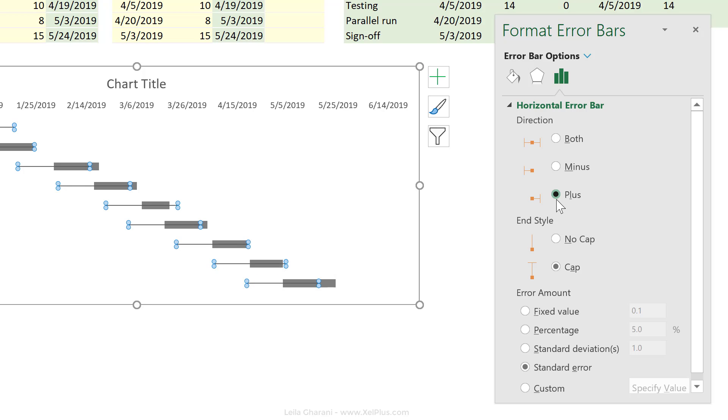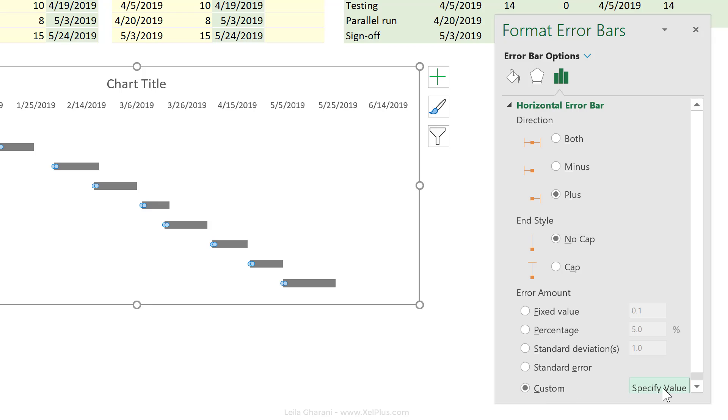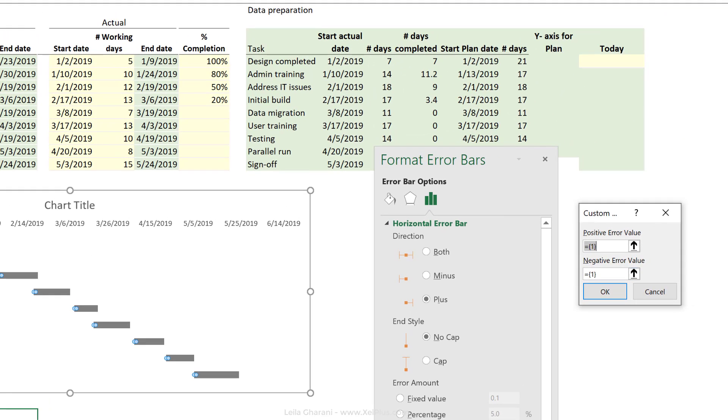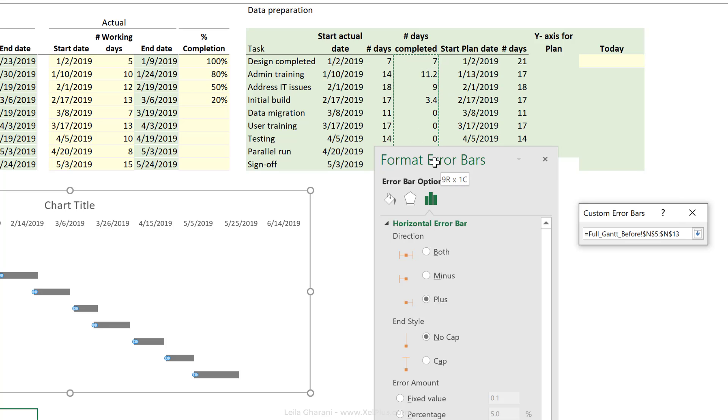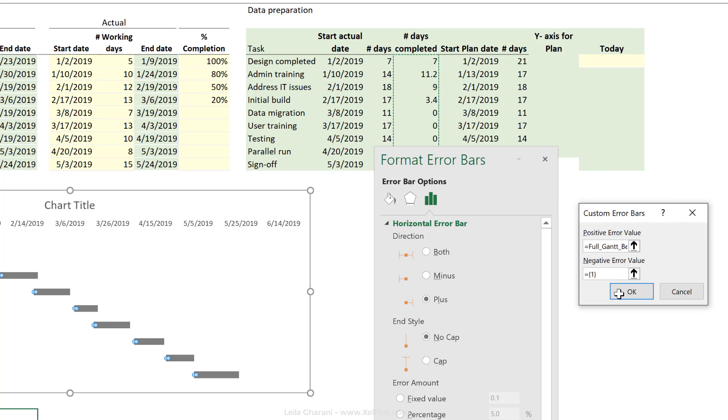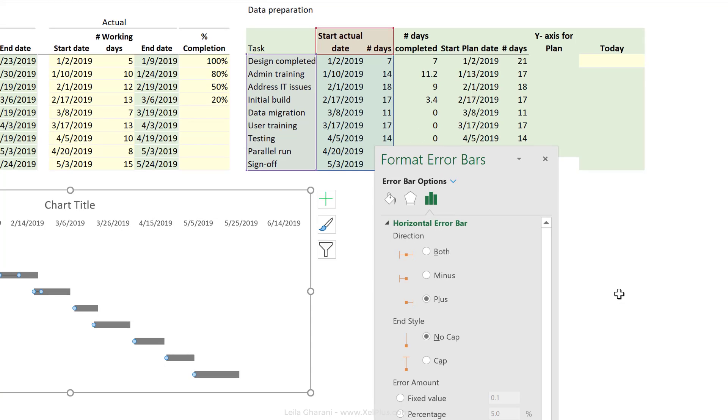Our marker is right in the middle, but we only want to show the plus error bars. We don't want to cap, and we're going to change the value to our number of days. So for the positive error value, that's going to be the days completed. Click on OK.